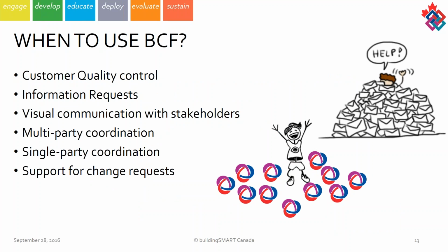So BCF can be used for different things. It can be used for quality control. If you've got a primary BIM manager in a project, he's doing some quality control. If he's doing some clash detection, some code compliance checking, he can exchange the results of that as BCF instead of sending a PDF to different stakeholders and then receiving their comments as markups in the PDF and having to merge all of those markups to have the latest information.